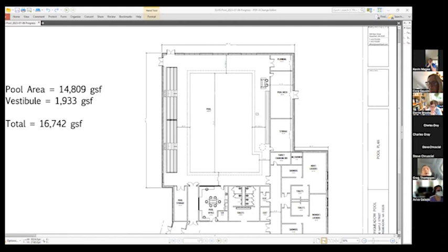Can we price out a 6-lane pool, 7.5-foot lanes with a decreased well, and then go to add-ons from there, so we know what we're talking about and we can a la carte it almost? Because I feel like what I'm describing is the $15 million pool. 6 lanes, smaller well, board in the middle, 7.5-foot lanes. I feel like I'm describing the $15 million pool. Is that probably close? Yes, because that's very similar to what we've been looking at. So that's what I'm saying.